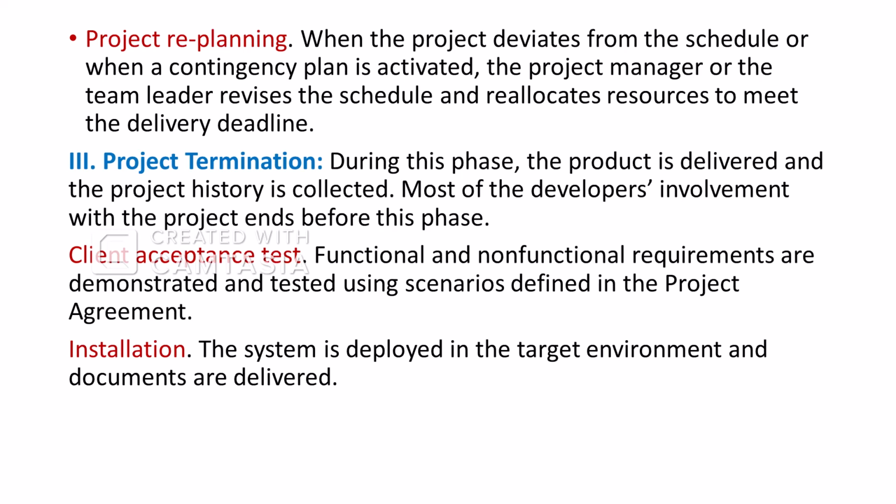Because what we have discussed earlier is that quality, budget, and time are very essential and crucial. So we should meet the deadline, we should meet the expected date. So if things don't go according to plan, we are obligated to replan the project schedule and reallocate resources to meet the delivery deadline. The third phase in this